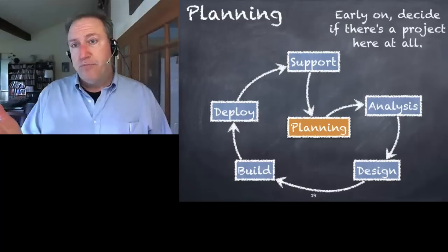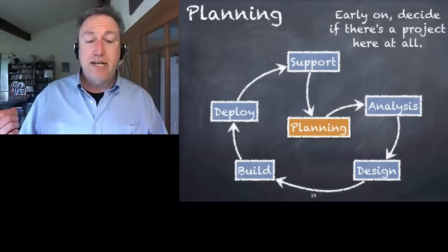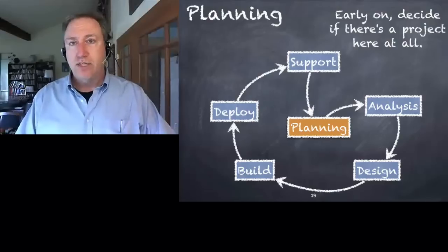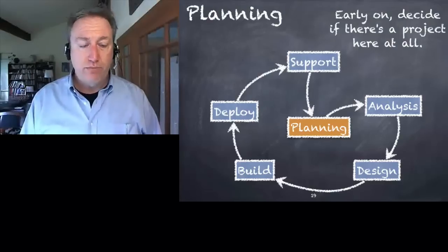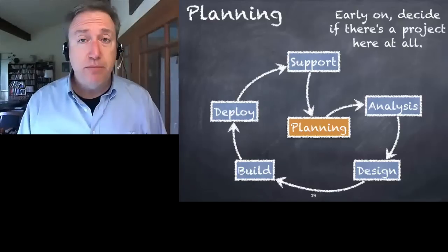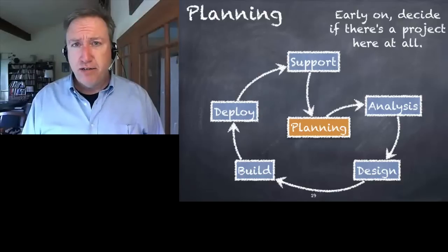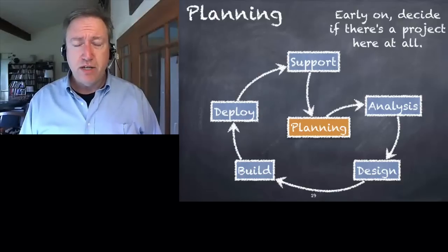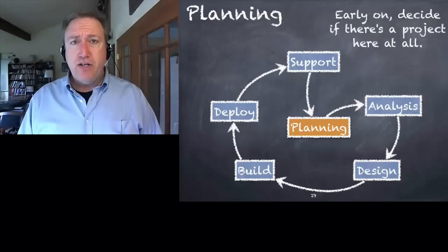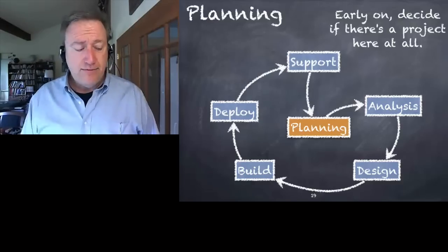For example, you've gotten data from your customers from the existing system, and they've said, this doesn't work, this works. They filed change requests or bug reports or whatever. You get a few people together, you give them a little bit of money for a budget, and you ask the question, is there really a project here? Is this something we should do? Is there a market for this? And you do a little bit of planning. You know a little bit about the system, and you plan the next phase.